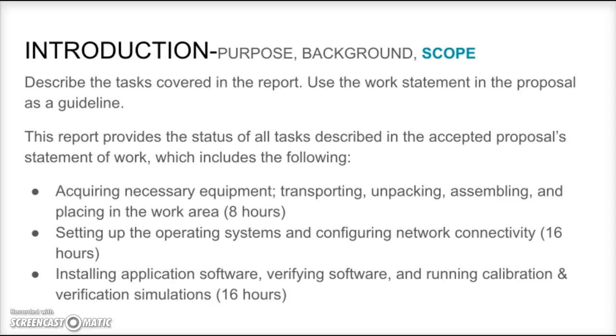1. Acquiring necessary equipment, transporting, unpacking, assembling, and placing in the work area, approximately 8 hours. 2. Setting up the operating systems and configuring the network connectivity, approximately 16 hours. And 3. Installing application software, verifying software, and running calibration and verification simulations, 16 hours.